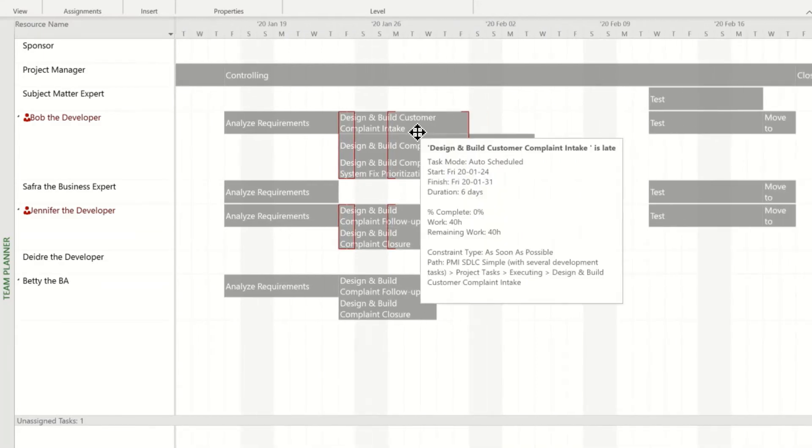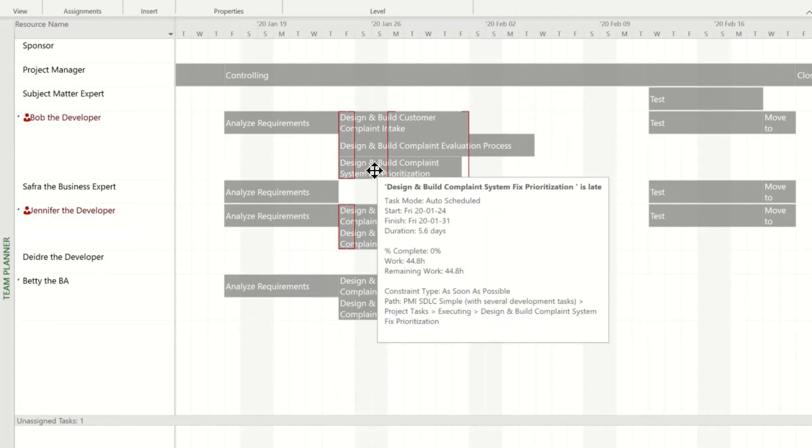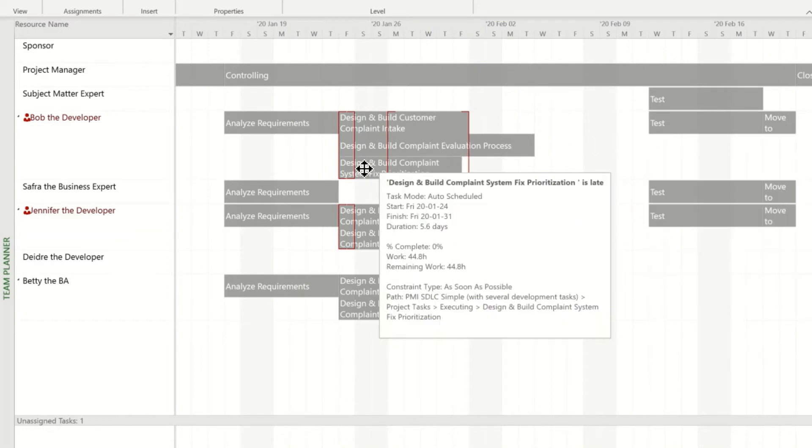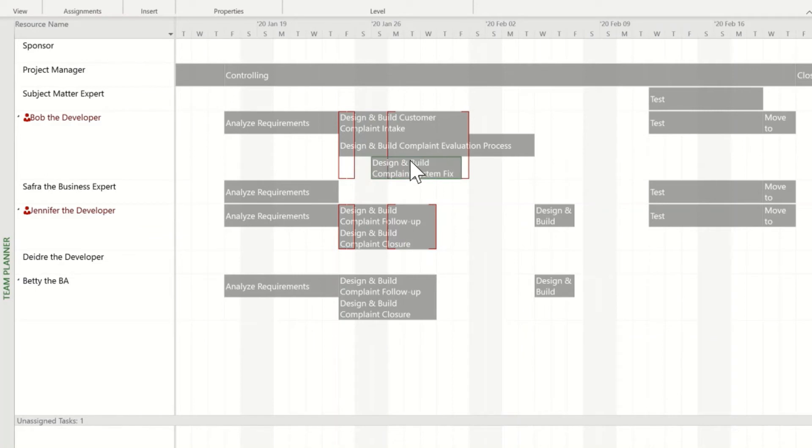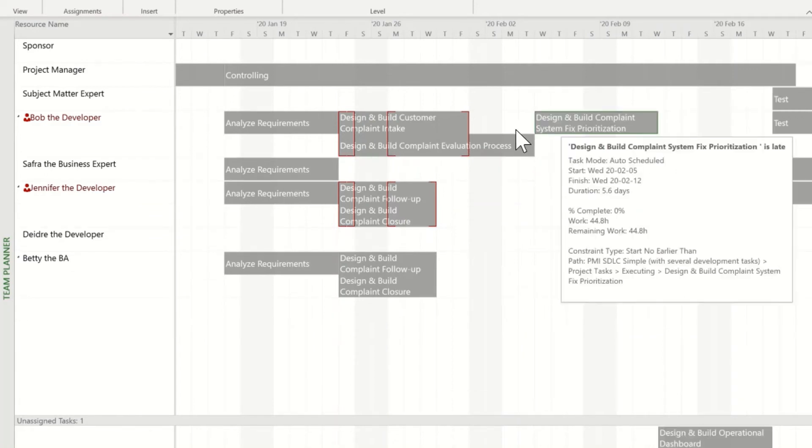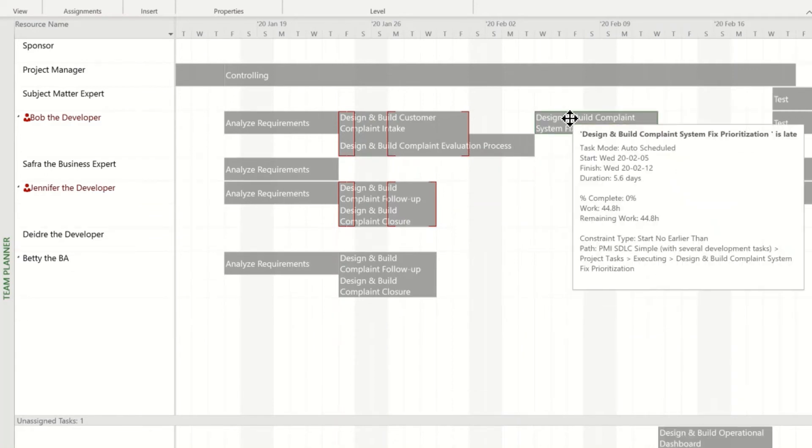First off, we can drag some of his work and reschedule it for later. Before I do this, watch this test task here. You'll see since it's linked in, as we move one of these activities, that one will move as well. There, we've moved this design and build task and it's pushed the test out.